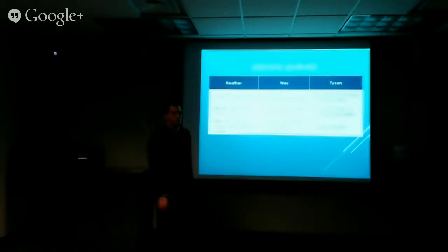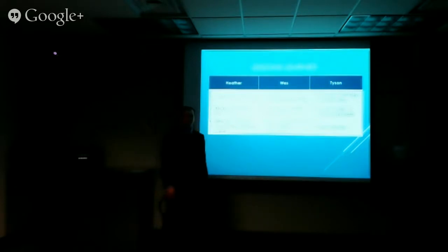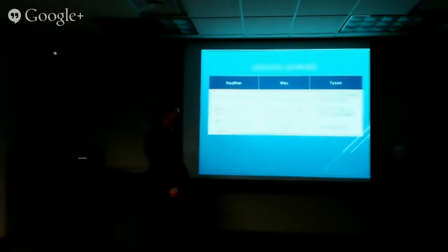The other thing is scope creep is very much a real problem when you have a very feature-heavy site with off-campus housing. We tried to design a site where we thought, oh, students could use this, and they could use this, and they could use this, and all of a sudden our list was 40, 50 items long. At the beginning scope got longer, and then it just kept getting shorter as we went back. But what we've delivered we're really happy and excited about.